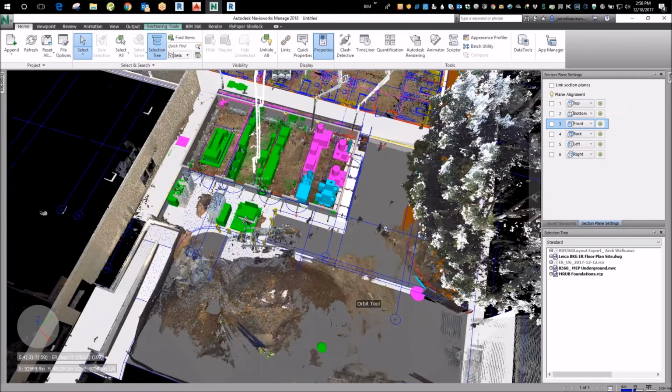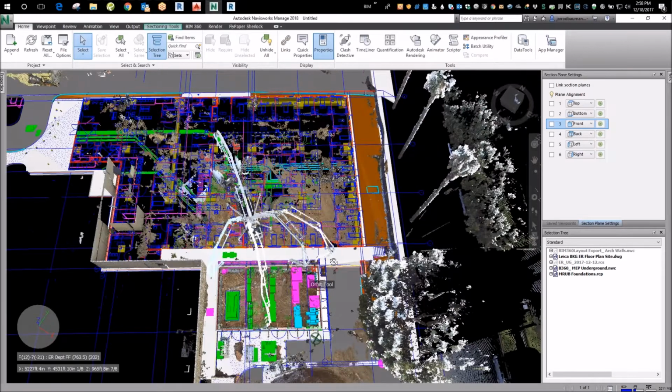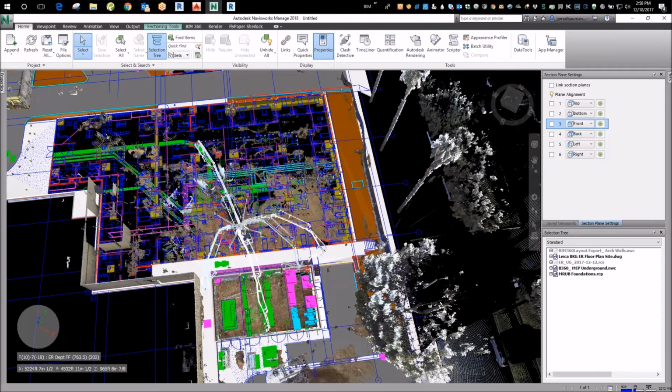So yeah, that's why having good coordinates, good control established at the beginning of the project matters, and we're pretty good out there at Etiwanda. Etiwanda's a little challenging in the fact that the control just outside the fences is now getting hard to see if you want to sync inside the building.